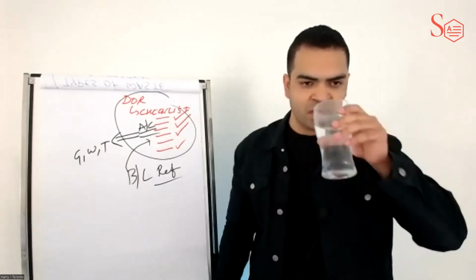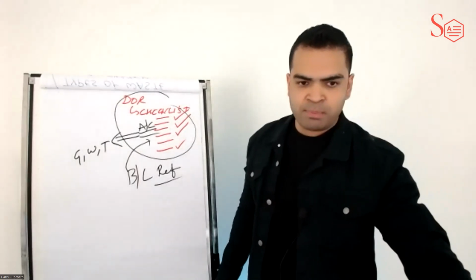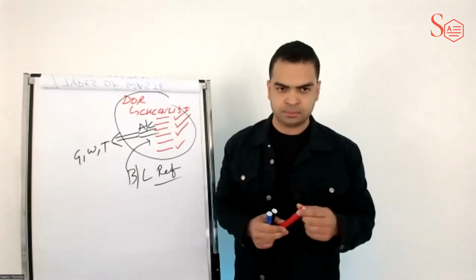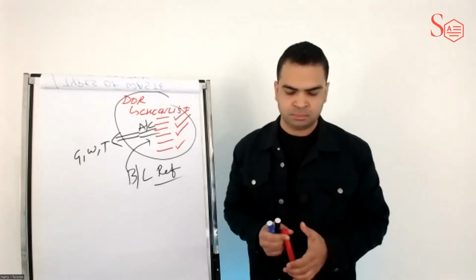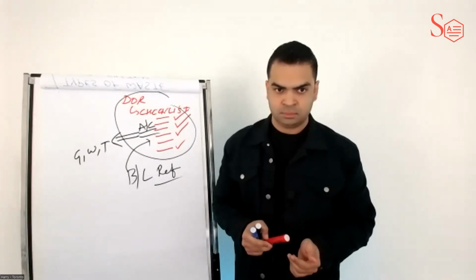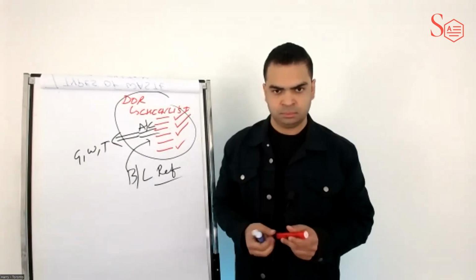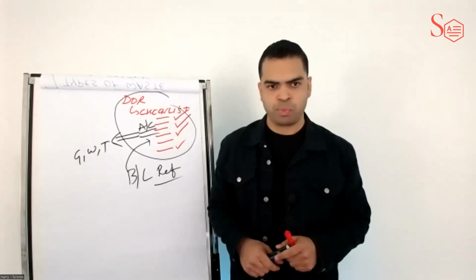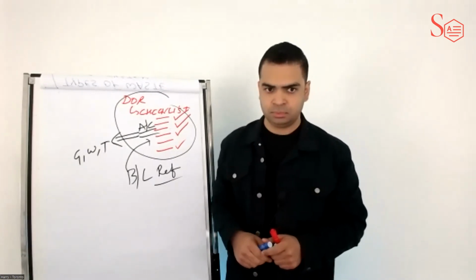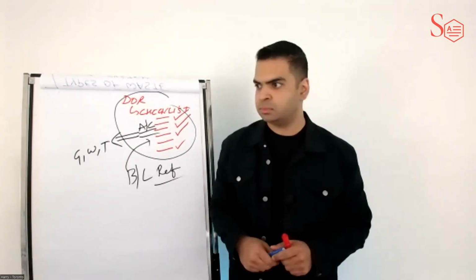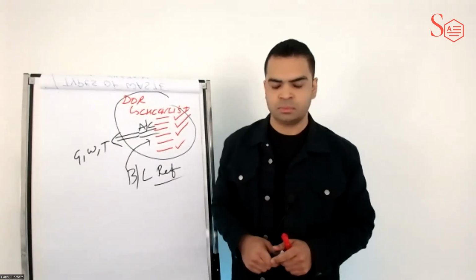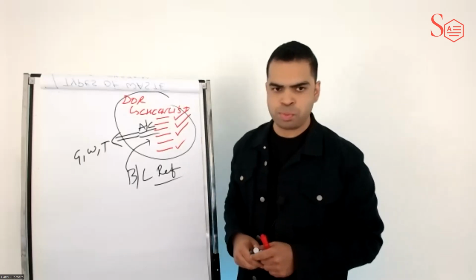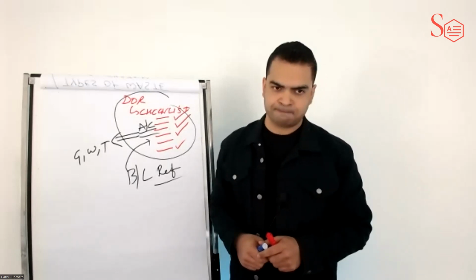Yeah, so generally, instead of approaching one feature as a whole, you divide it further. And then for each scenario, you mention the scenario in the given part, say, given this is the background or this is the scenario. Then when, say, the user clicks a particular button, then as a result, this is supposed to happen, so that it's very clear that these are the steps, this is the background, and this is the outcome we are expecting, so that there's not much deviation from what we are expecting and what is finally being developed. So it does help.